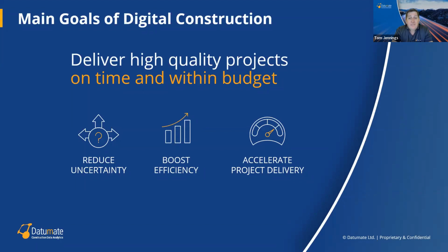WRS found that by flying the site using an RTK drone, from a secure location, they were able to decrease risk by keeping surveyors out of the way of heavy equipment. The drone data could be processed in hours and shared across the entire enterprise so that the decisions could be based on real-time data. Progress is measured against the design files so that costly mistakes are discovered immediately or eliminated altogether.